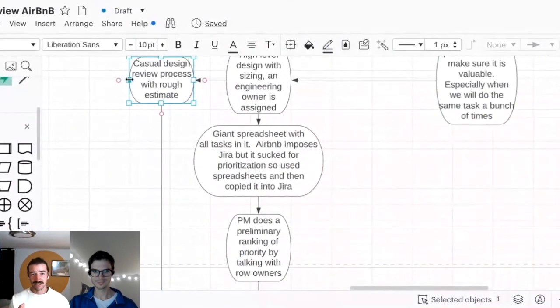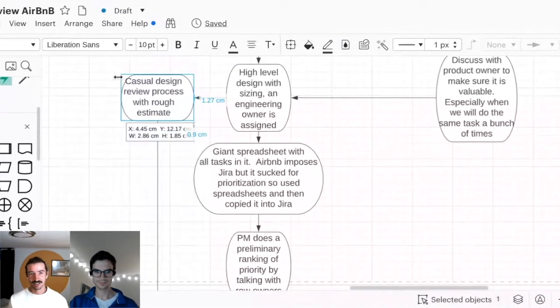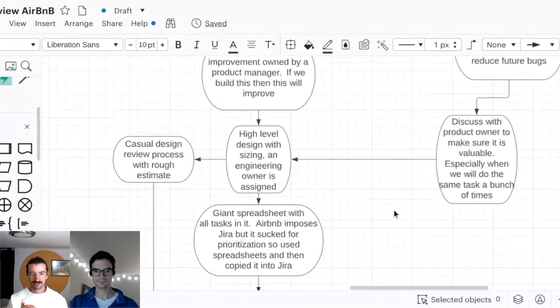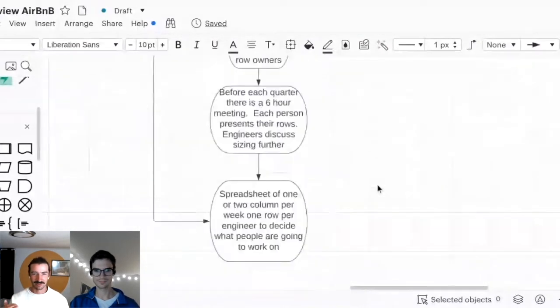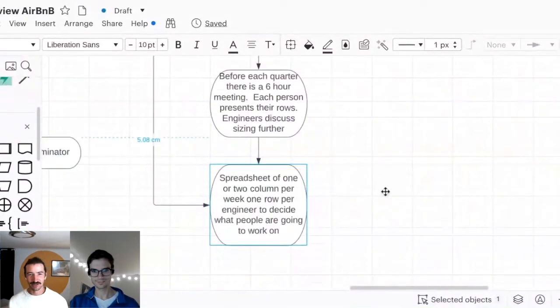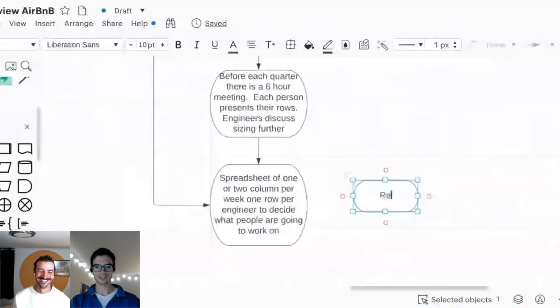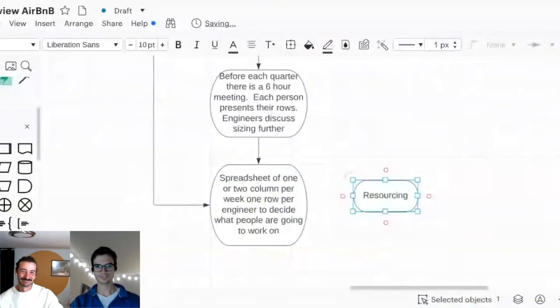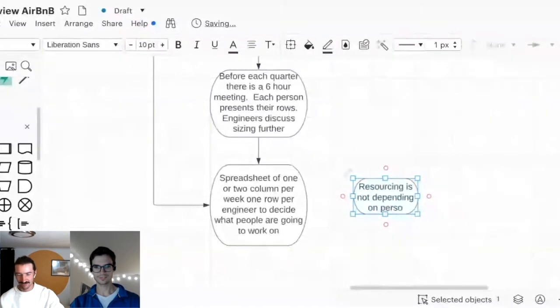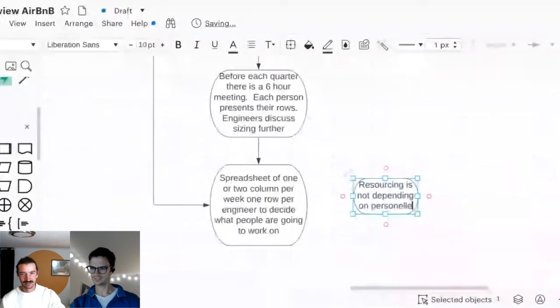But beyond that, one thing that I really don't like about this process, and this is not unique to the payments team at all, is a project you might say, oh, this will probably take about 10 engineering weeks. And then you get assigned like 5 weeks from someone who just joined the team and is just out of college and maybe has never written JavaScript before, and there's a bunch of front end work. And now your project is in trouble before you've even started. Yeah, I think that was a little bit under discussed just because it's a lot easier, especially for engineering managers, to sort of act like their engineers are more fungible than they actually are.